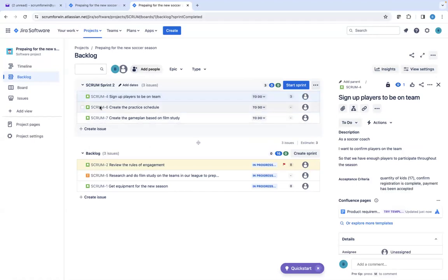And as we see here, this is the way the Scrum guide actually says it's supposed to be done. Anything that's not completed and accepted as complete within a sprint should be moved back to the backlog. And then during sprint planning the following day, the items should be pulled for that sprint based on priority and based on capacity. But what happens in actual practice is typically we see teams roll it over to the next sprint because they say this is the work that was already in progress. So this is the highest priority stuff. Instead of going to the backlog, we'll just roll everything over.